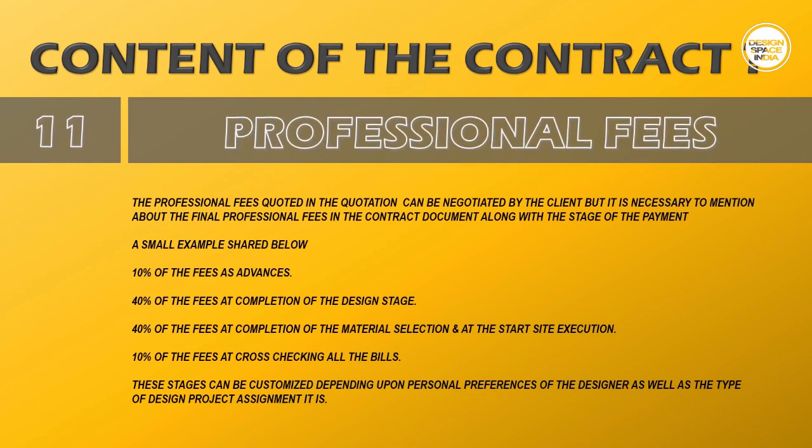Though the professional fees are already shared with the client in the quotation which is provided to them prior to the contract agreement, the client can negotiate with the designer regarding the professional fees in a meeting prior to sign-up of the contract. Multiple factors can be responsible for that, like budget restrictions of the client or alterations in the scope of work. So, it's always better to attach the final professional fees approved by the client, and the stages of payment of the professional fees, with the contract document.